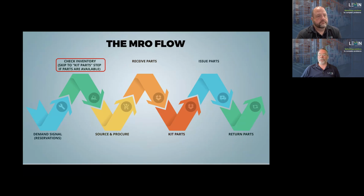So I say, can I do this job next week? Ooh, no, I can't. The lead time's 50 days, so I'm going to have to plan that out. Or I need to stock that part because I can't wait 50 days. This is an unplanned demand that creeps up, which is what we talked about a bit earlier. So yeah, heaps more to talk about, a lot more examples we can share with you, but this is usually a powerful piece of your ERP system that will do this for you, but it relies on good data, accurate stocks.